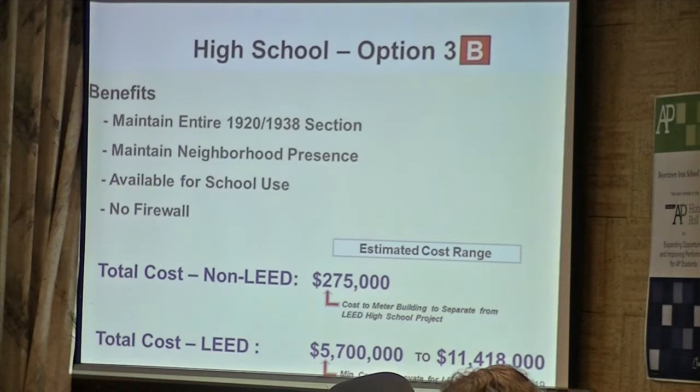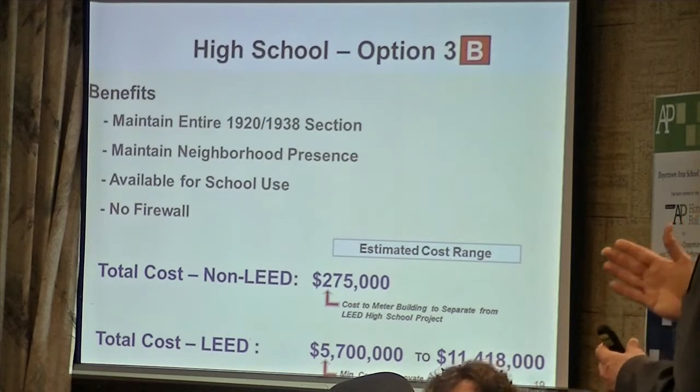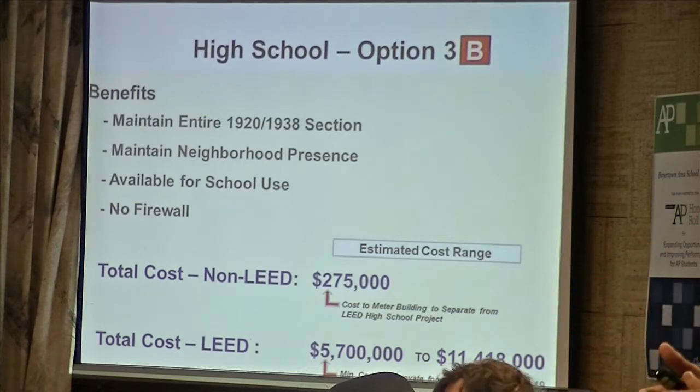So if you want to try to get whatever you're doing as part of the bids, then you have to start to tighten the timeline. It becomes really tight because let's say we need 6 months or so to put together a design for this project and design all the systems. You start to push it back where we need a decision within the next couple of months, pretty quick.